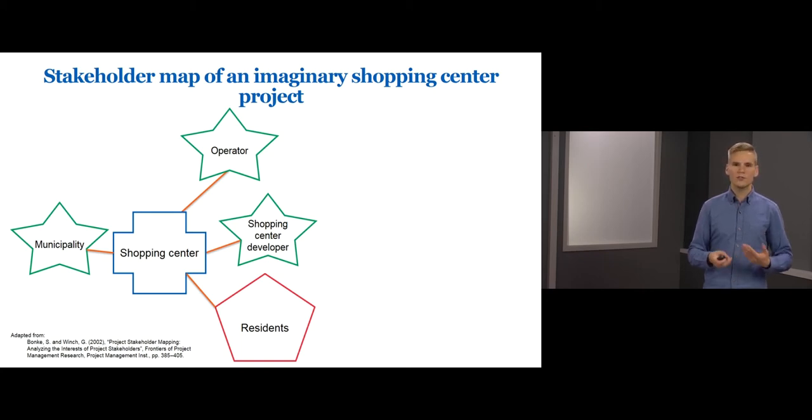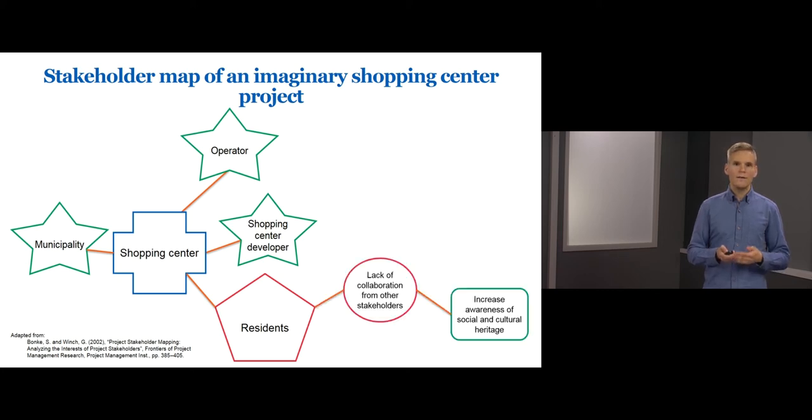Now let's consider some examples of problems and solutions that these stakeholders may bring into this project. First, the residents have a problem that they are very concerned about the collaboration between stakeholders, as they have been somewhat excluded from the project. The residents are particularly concerned about the social and cultural heritage of the area and think that the new shopping center might ruin it.